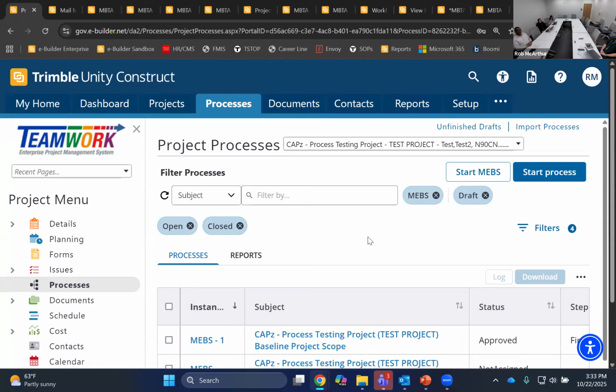And then the scope change committee will review that request before the process gets started. That way, we are not waiting until we go all the way through the process to get a rejection. We'll get the rejection right up front before the process starts. Also, we've added some additional members to the committee to allow for changes in particular to the core capacity program.